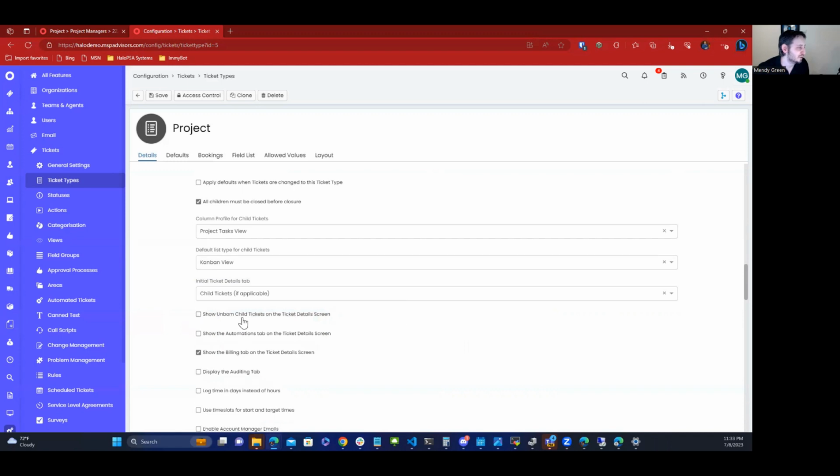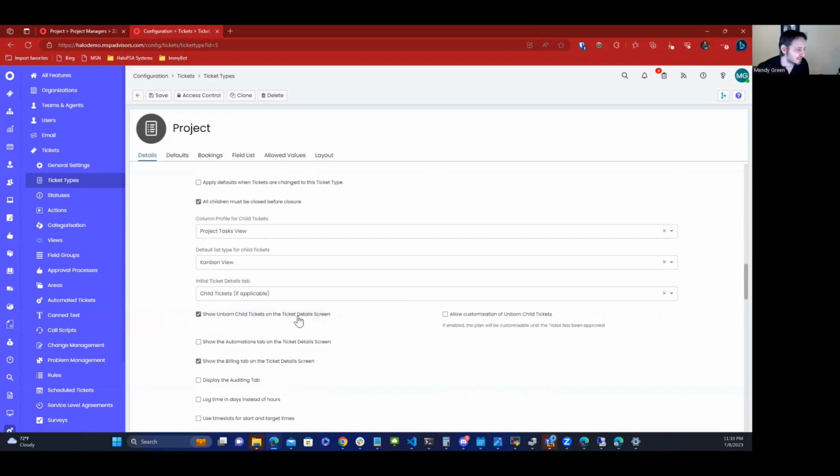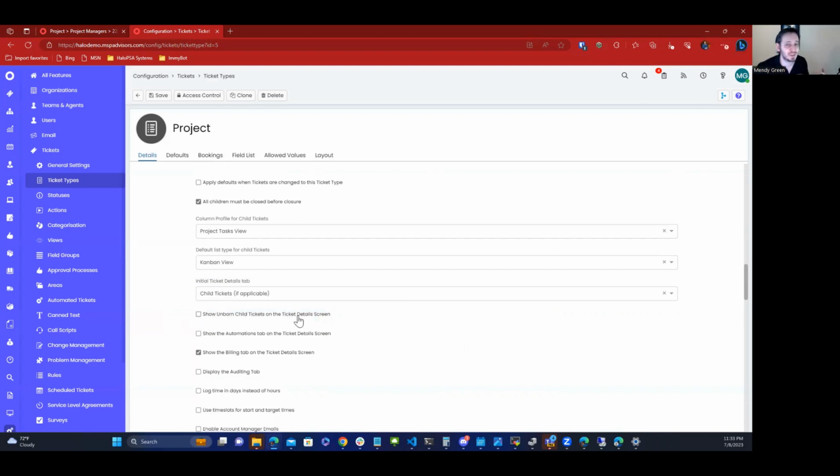These are settings from the project planning side, where a project plan can define how a project task gets created using what rules. Only create the second task when the first task is completed, or create the third task if approval is granted on a specific custom field. These are types of rules that you can create that define when child tasks or child tickets get created on the project as tasks.